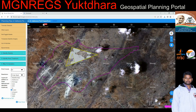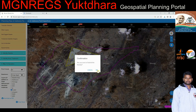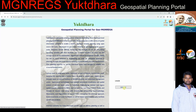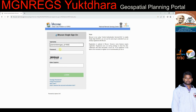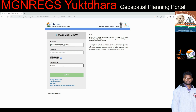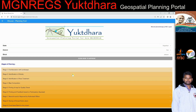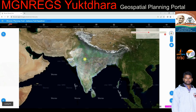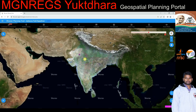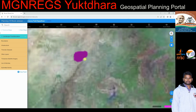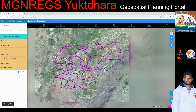Submitting maps for the approving authority: the portal provides upload and submit action plans for approval. GAS has authorization to approve the plan activities created by the MSE. For approving plan activities, the GAS user logs into the Yuktara web portal with their username and password, then navigates to the respective administrative boundaries — state, district, and block — and clicks 'Click Here to Approve.' In landscape familiarization, the GAS user has an additional option: submitted activity.